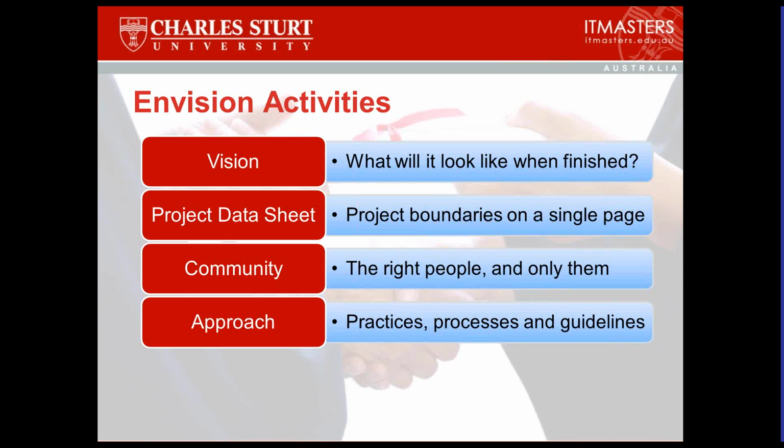designing the box. So the process of box design, which sometimes can go a little bit too far, but it's the concept of brainstorming and workshopping the idea of what are all the things this is going to be and do and look like. And sometimes if you're talking about a physical product, that might mean designing the box that it's going to get wrapped up in. But that's also a philosophical concept. If you're dealing with something that's non-physical, then still you're looking to define the elevator pitch. Define it in the context of a simple statement. The elevator pitch being the 30 seconds to 2 minutes statement of what this thing is.